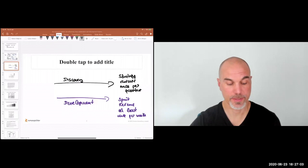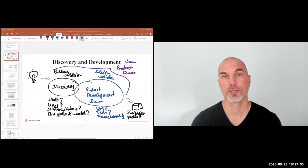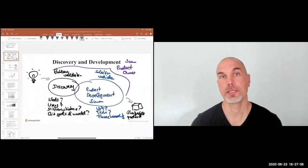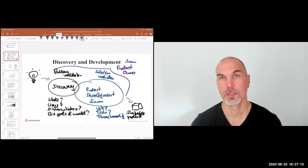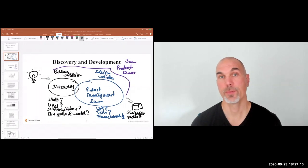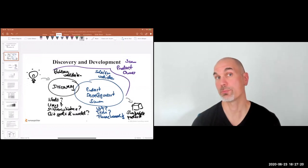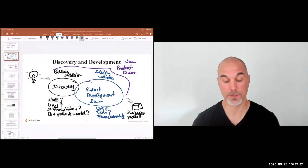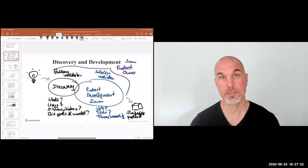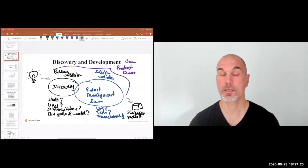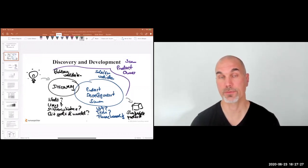Nice question. With the time-boxed discovery I've tried to sketch here, how much time you should spend on discovery will depend on how innovative the development effort or product is. The more innovation there is, the more uncertainty and risk there is, and the more time you're likely to spend in discovery.